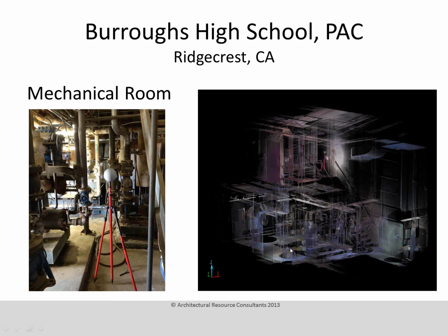And what's great about this is even with spaces that are highly congested and have lots of difficult geometry, such as all this piping and conduit, once it's modeled, you could then prefabricate and bring out new pipes and fit them right through this mess without having to worry that you're going to have collisions. So a lot of the contractors are really driving laser scanning and modeling as part of their process now as a result.